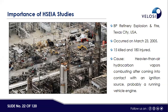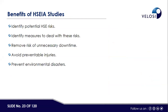One notable accident occurred in the USA on March 23rd, 2005, which killed 15 people and injured 180. The cause was heavier-than-air hydrocarbon vapors coming into contact with an ignition source, likely a running vehicle engine. This accident taught us a lesson: we must identify all environmental, health and safety impacts and mitigate them. The benefits of HSEIA include identifying potential HSE risks and the measures required to mitigate them.